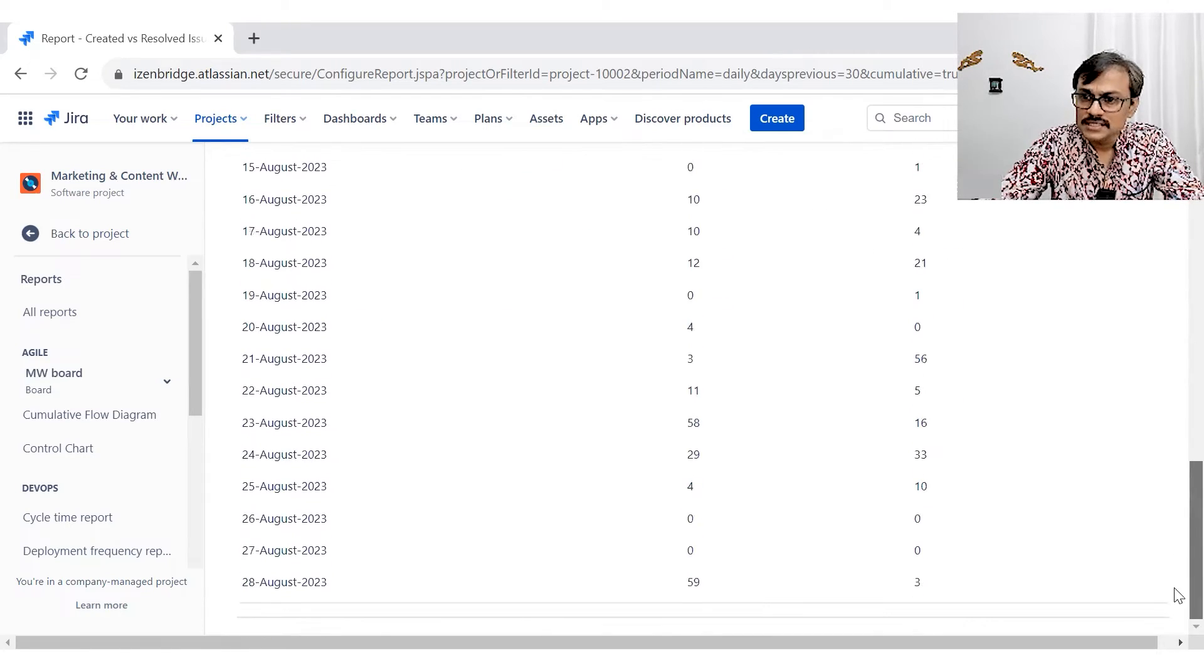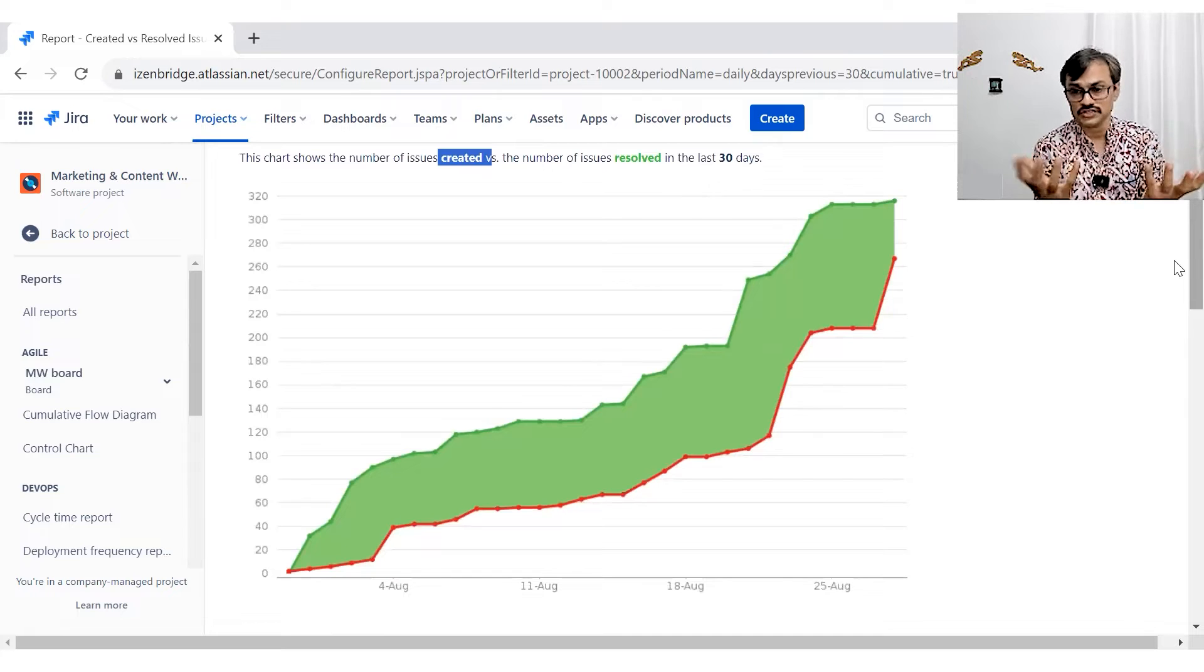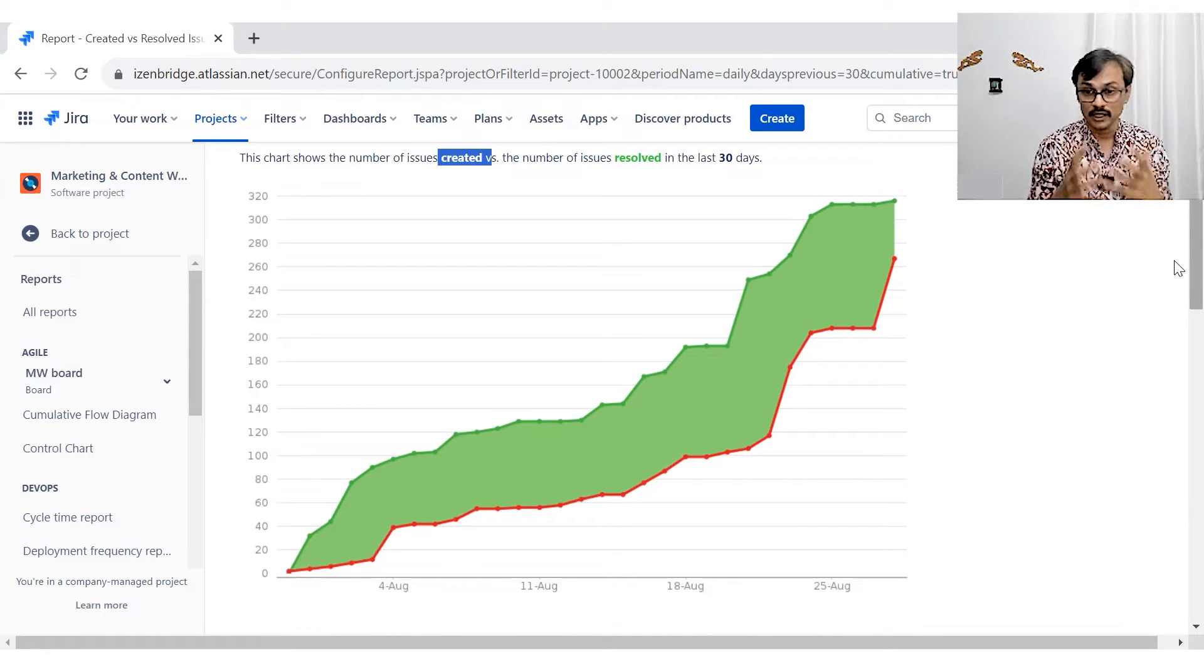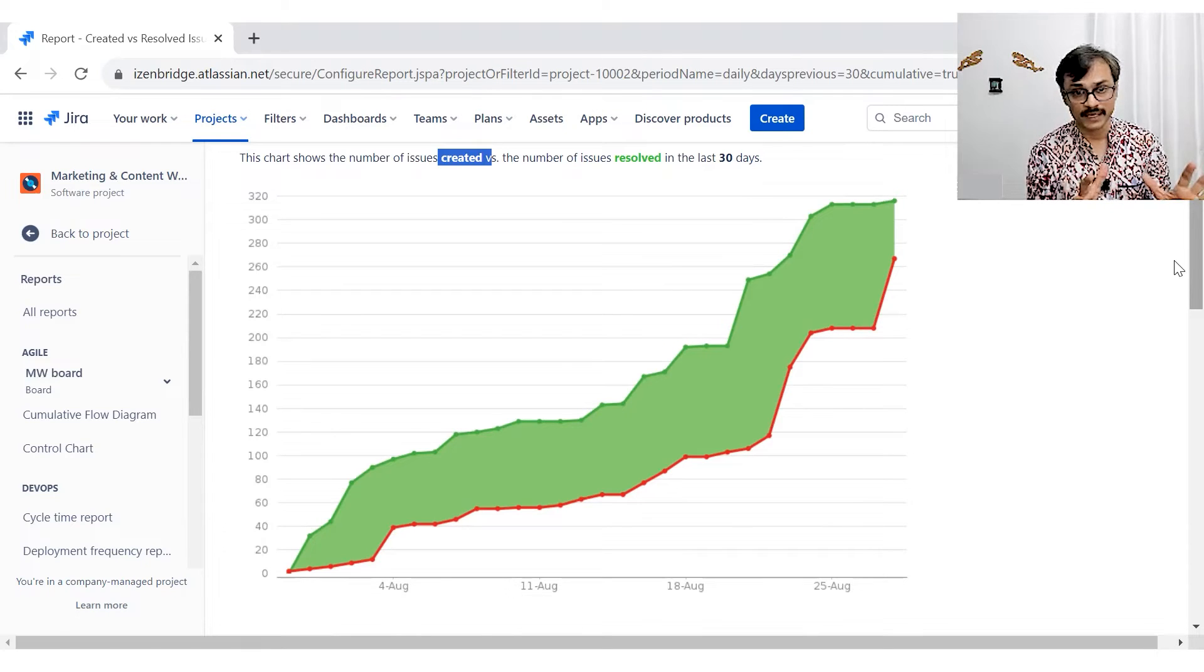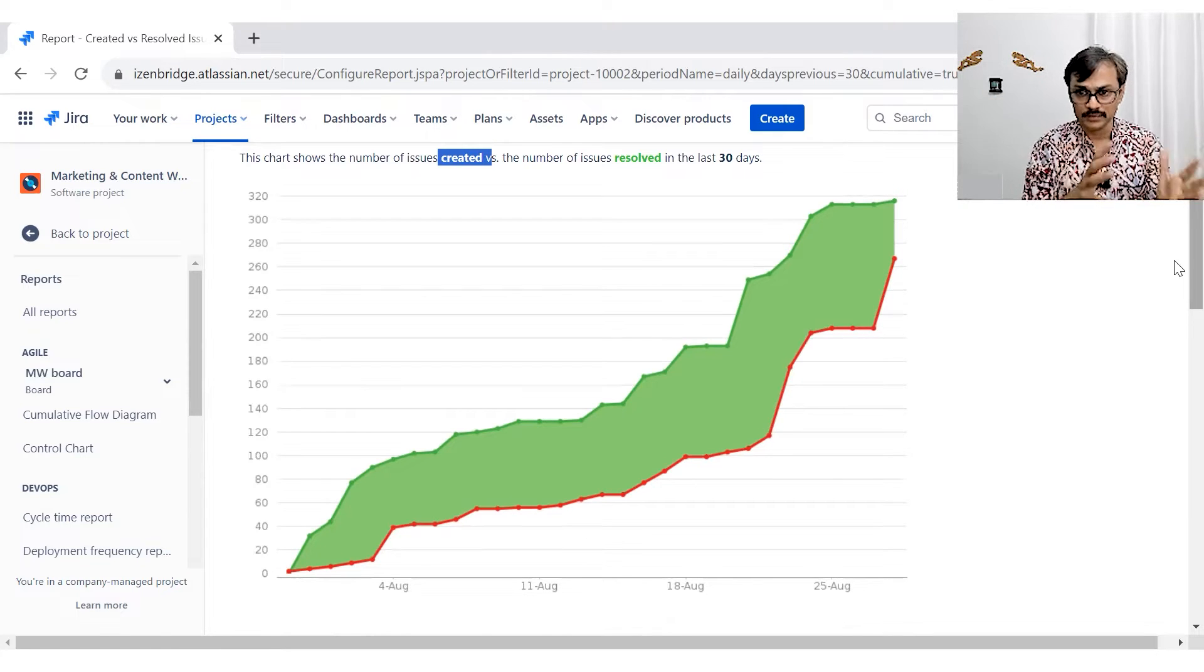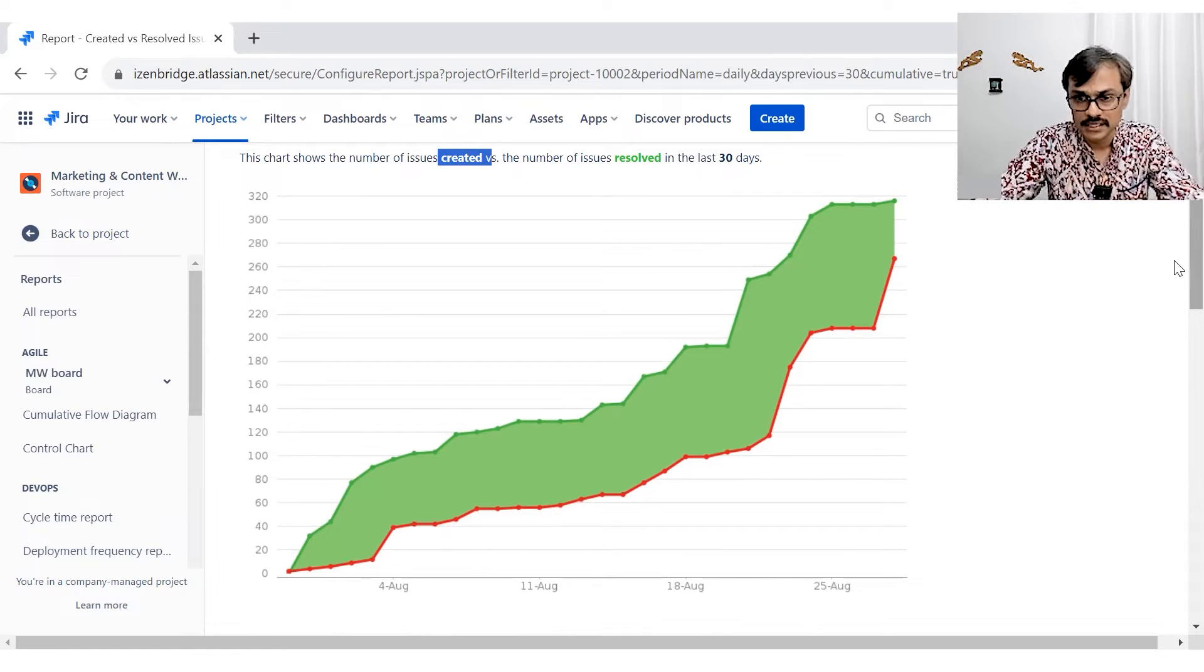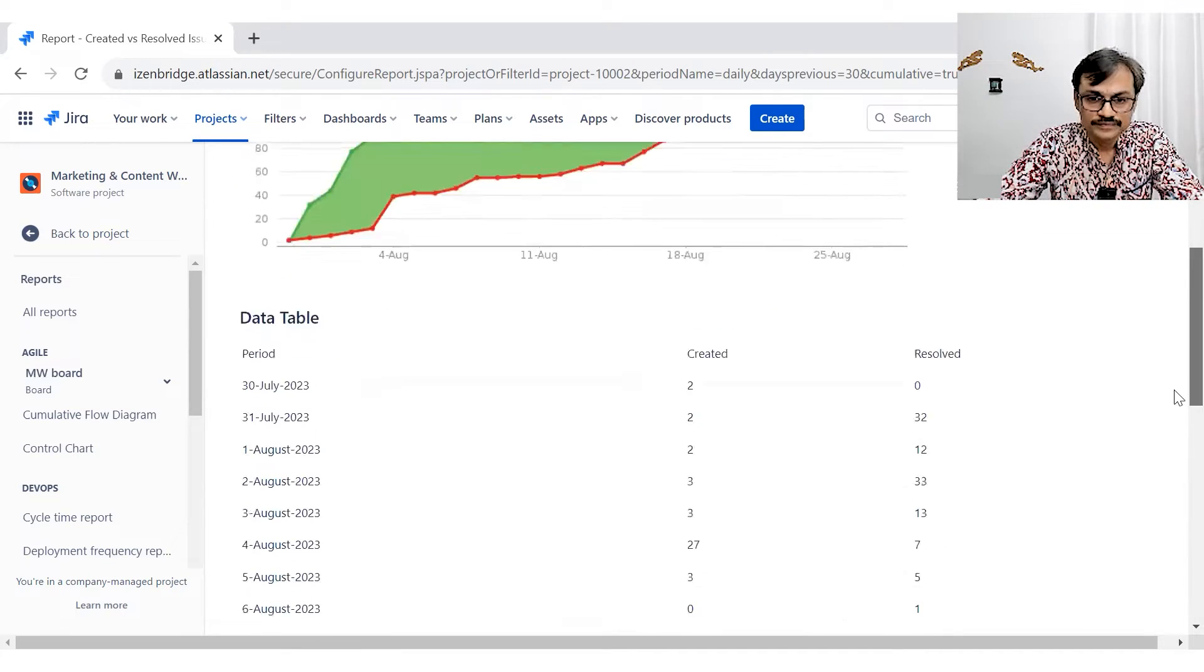So this is a cumulative one, which in a way, if I see it here, this trend looks pretty healthy to me because we are, looks like we have a lot of backlog that is very clearly coming in, even though we are doing more and more issue resolution, but still we have a gap because we have a pending work to take care of. Yeah. So this is your created versus resolved.